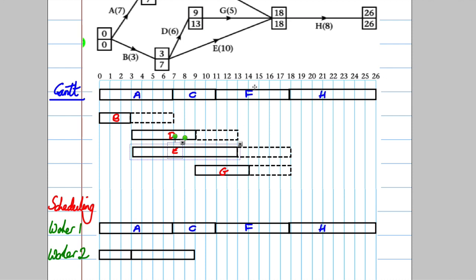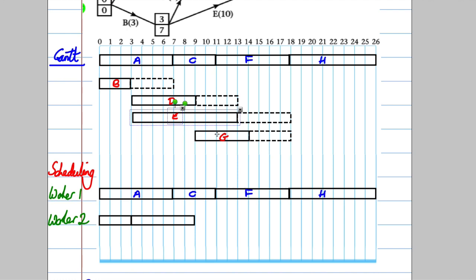But G, which happens after D, can slot straight in there. So activity G in this case, starting at 9, ends at 14, we can slot that in here, like that, activity G. So just to label the ones we put in, we put B here, we put D here, and we put G here. But unfortunately now we need another person, which is a worker 3,